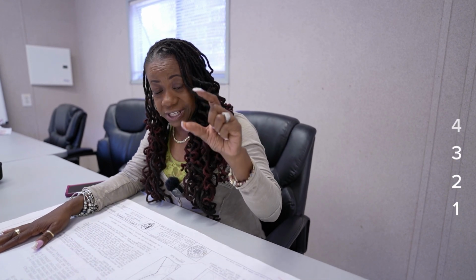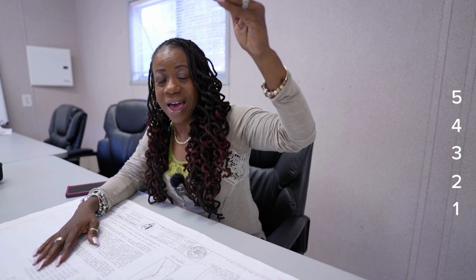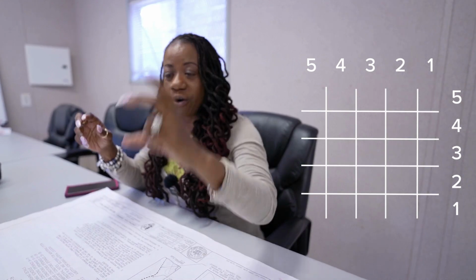So, what I'm really proud of was the idea of taking the existing elevation sheets that are in the documents, numbering the courses from the bottom course to the top, because that's, you know, how you build a building. From the bottom course to the top, numbering that, then going across and numbering each stone. Thereby, we would create a spreadsheet, and so you would take course 1, stone 9.